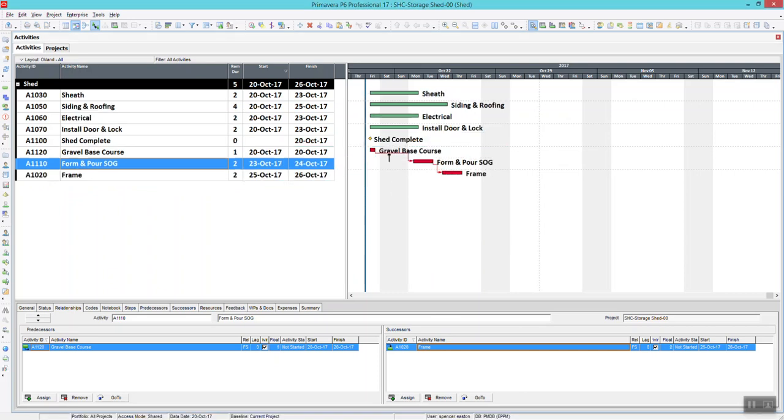Then I can F9, and now we're starting to see that logic start to build, and all the stuff that is not linked, because I have my relationship lines right here on. You can see those lines here. And that is the other way. There are some tricks that you can use with linking using this method or the right-click link method.